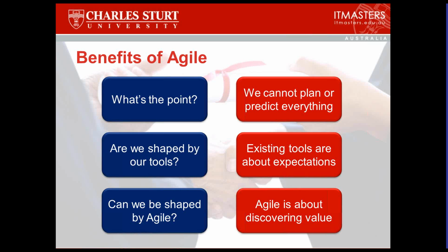So let's go back a step and redefine what we're talking about as what is the risk and what is the mistake. And then how does an appropriate contract deal with that? Well, in the example that we talked about before, we're saying the price is fixed and the deadline is fixed, but the variable is what we're going to get out of it. Then clearly you're going to have a contract that says this is fixed and this is fixed, but this isn't. It's going to be very different from a contract that says, well, you're going to build a bridge and it's going to be 4 lanes and it's going to support these kind of trucks. And that's inarguable. That's obviously a very different kind of contract.